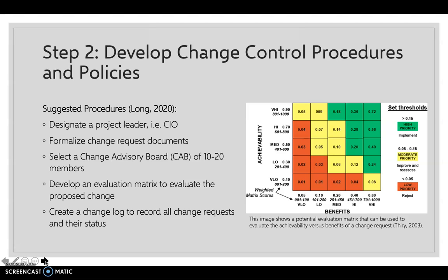They should develop a procedure for managing change requests by creating a change log that records all approved, deferred, and rejected change requests that have taken place. Lastly, they should create a document for analyzing changes post-implementation so that they can learn from previous change requests and their outcomes.